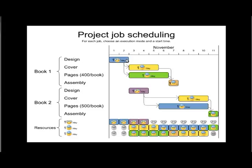As soon as the design is ready we can start producing it, but no earlier. We will start producing the cover — 10,000 covers over three days — and simultaneously produce the pages: 10,000 copies of 400 pages per book, taking four days (about 100 pages per day). We can do these two things in parallel, assigning one worker to covers and one to pages, so by day seven both are done.